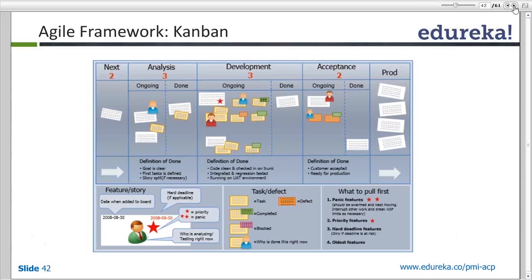This is called the Work in Progress limit. When you start a project, you define a WIP limit. For example, if there are five items in progress and two in done, I will not pull anything new from not started to in progress until I clear the in progress section. I make a hard stop at five — once I reach that limit, I complete the in-progress items, move them to done, and then start new ones.